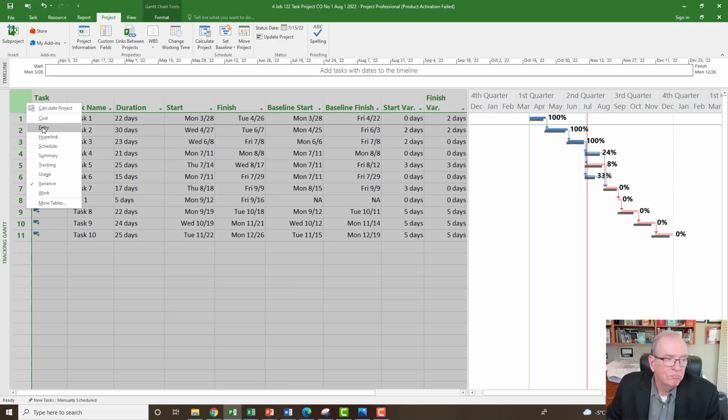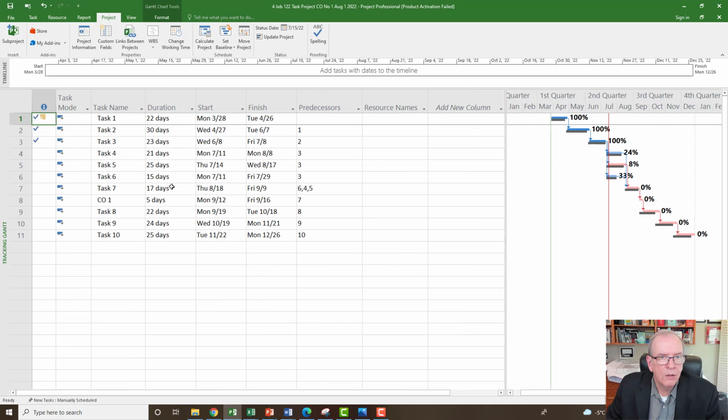Now, let's just say we wanted to update the schedule to that date. If I was just checking to see the impact of that change, then I'd want to fill out that change order and price it properly so it reflects those extra costs. Because now I know it's delaying the project 5 days. Perhaps I would want to pull that time frame back and do that with overtime and other things.